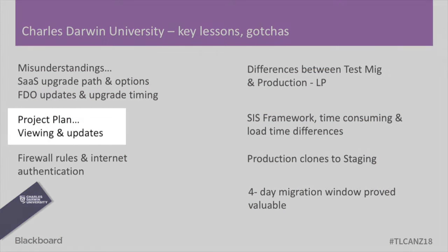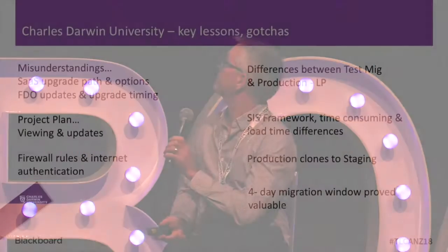We also had issues with project planning. The way we worked on the project plan is that Blackboard developed an overall project plan that you signed off on as a project charter, but we had some issues with the currency of the project plan. Instead of the plan being viewable and updated on a day-to-day basis for us to maintain where the project was in the cycle, we were getting it weekly. It was a lesson we've learnt from, and we've been talking to Blackboard about it going forward, to ensure that you're on the same page in terms of the currency of the project plan.